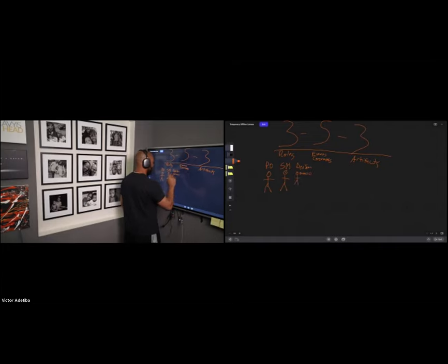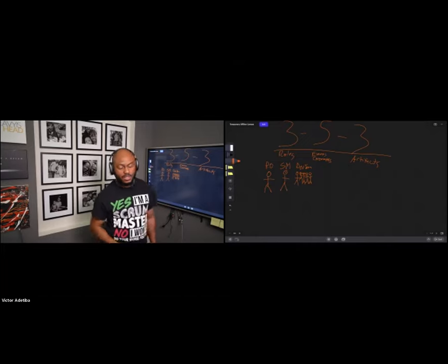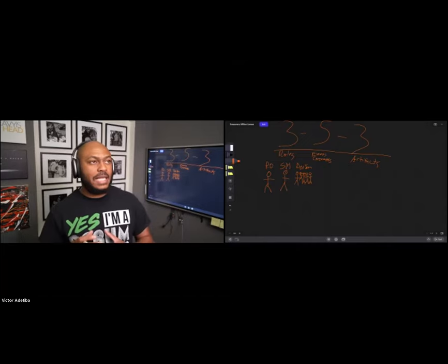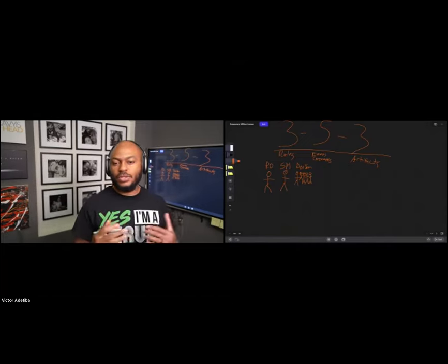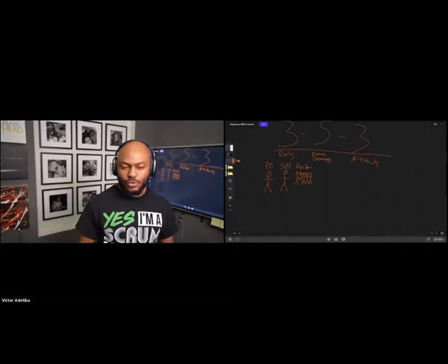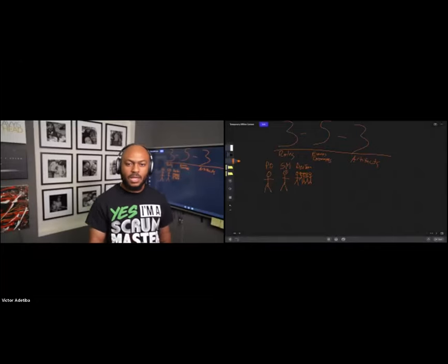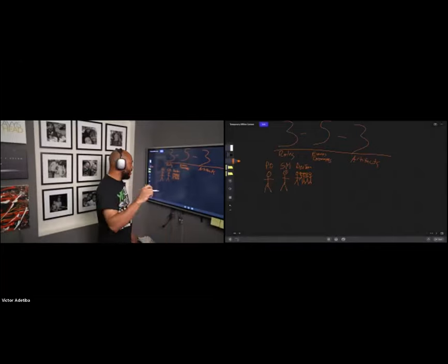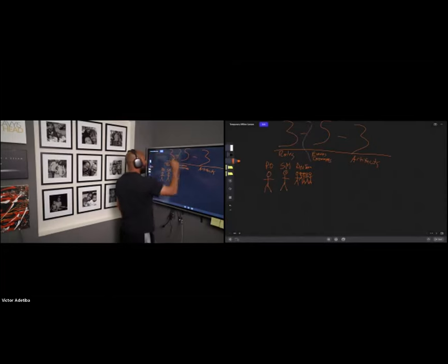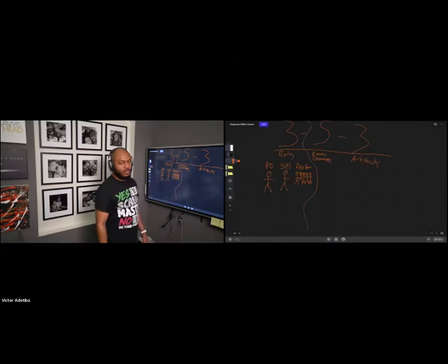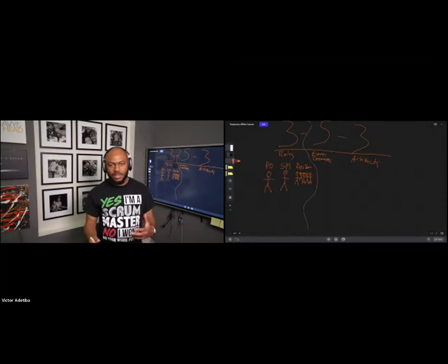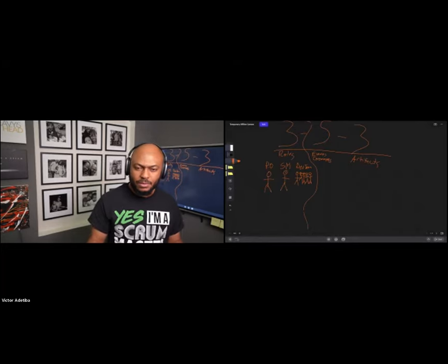These are the smart guys — the coders, the testers, the QA team. Normally, a Scrum team should be six members plus or minus three. So on the high end, you want a total team of about nine, and on the low end, about three people on a Scrum team.